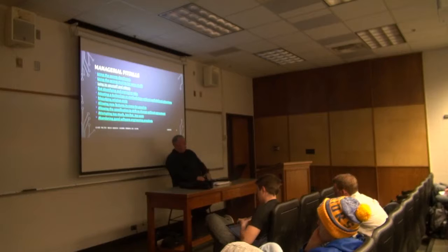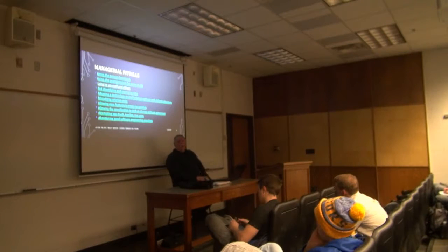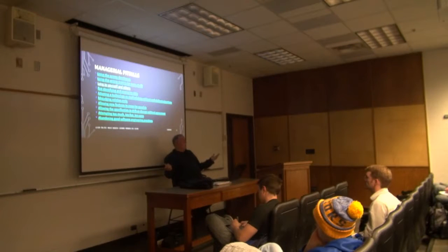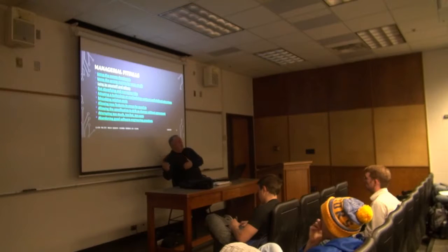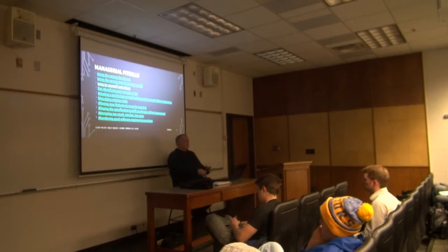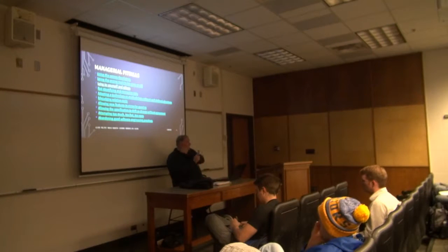They had, up on Silverlight, which of course Microsoft is now end of life, an active risk management system where they would identify risks, and categorize them as far as what type of risk it is and what portion. This is all for their customer-facing credit card website. What the likely impact is, what the probability. They reviewed this weekly, they prioritized working on them, and so on. An organization that is actively seeking to identify and manage risks is a good organization.